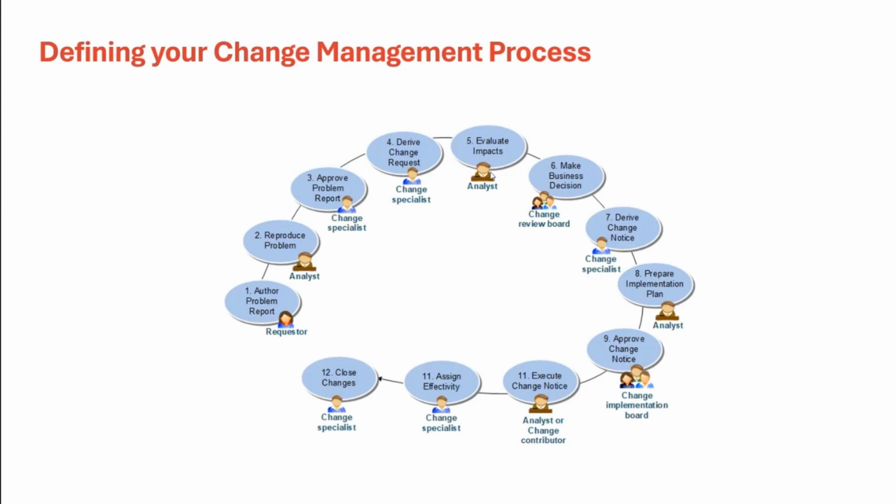We added the assembly, that's the blade disk assembly, as the impacted item. We also attached a specification document and filled in all the properties for costing, priority, severity, and so on. Then we approved that change request as well and derived a change notice from that change request.